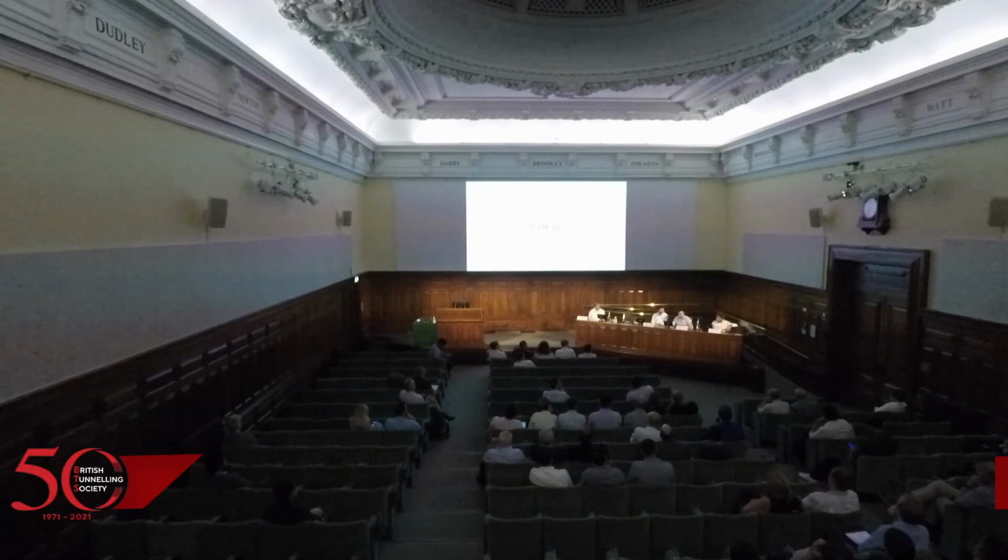And the evolution was from Cremorne. Cremorne started with a non-self-compacting mix, and we went straight away into a self-compacting mix. Why not do self-compacting mix since the very beginning? Because you know you need to allow enough time for trials, and we didn't, so that's the thing. Thank you. Some useful lessons for future projects. Thank you very much.